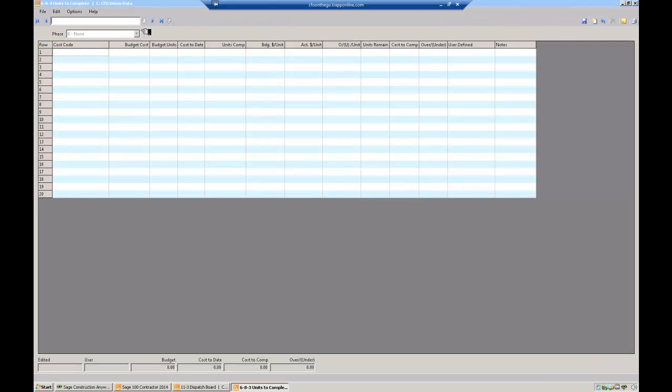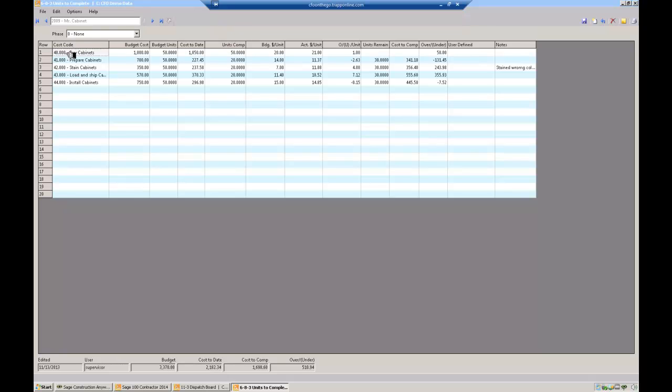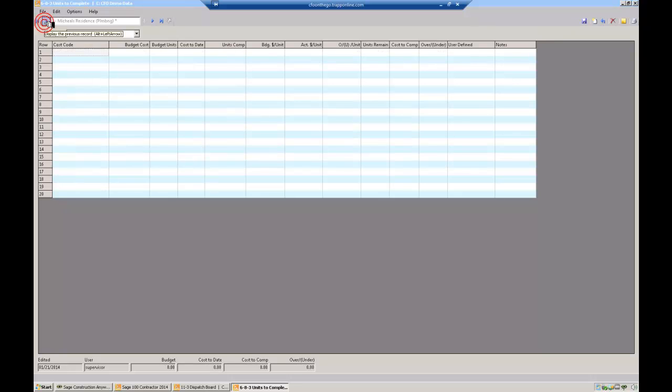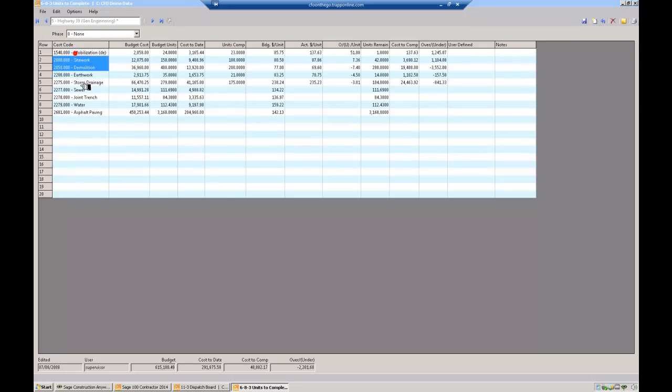In addition to that, one other way of looking at it, and this is my favorite way, and if you've watched any of my other videos, you've probably heard me say this before. Again, put your task in here, ignore what's here, but mentally just insert your task. Again, this is what the budget said it was going to take. This is how many units I had. It could be 24 squares, 24 cubic yards of removal, 6 truckloads to the dump, whatever it is. It's measurable units. Cost to date in the system, which includes all your payroll costs plus the associated burden.